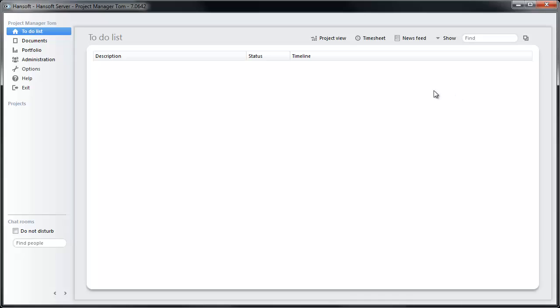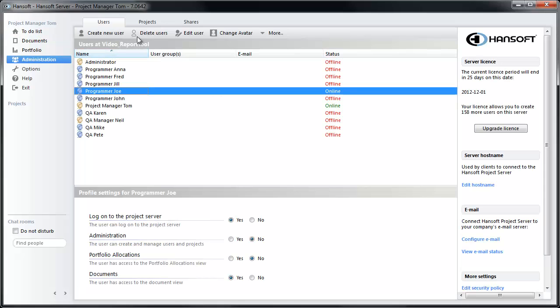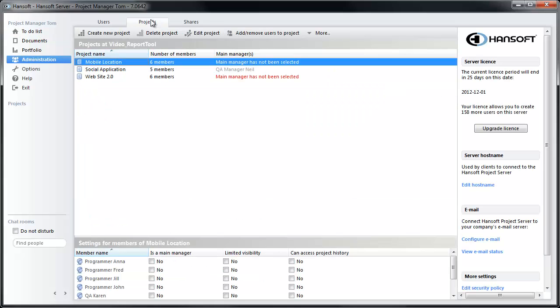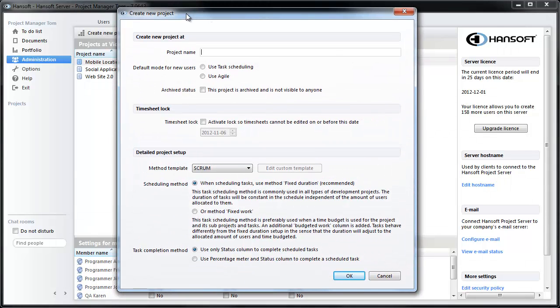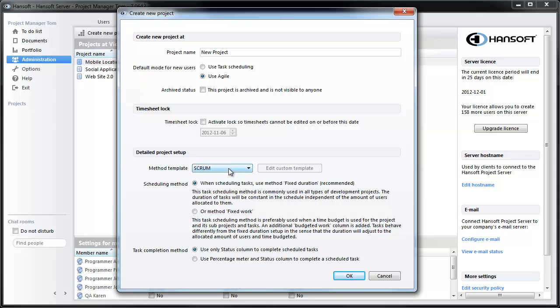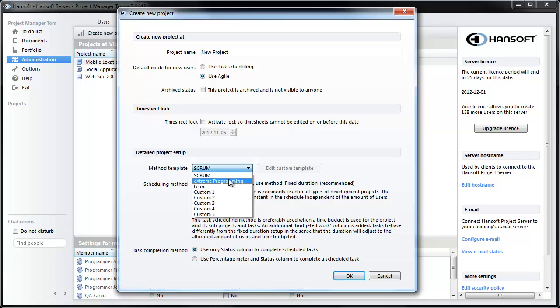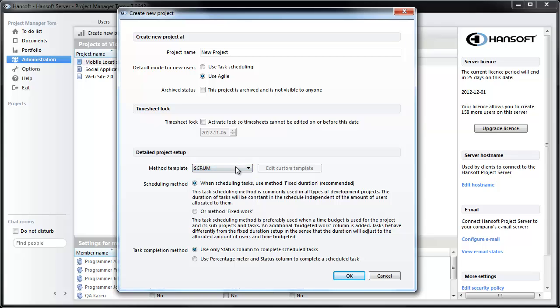First thing I'm going to do is move over to the administration tab and set up a new project. I'm going to use default mode agile and leave the rest as is. If you want to change the names of the different components in the project you can use these templates to define that, but for this project we're going to use scrum.